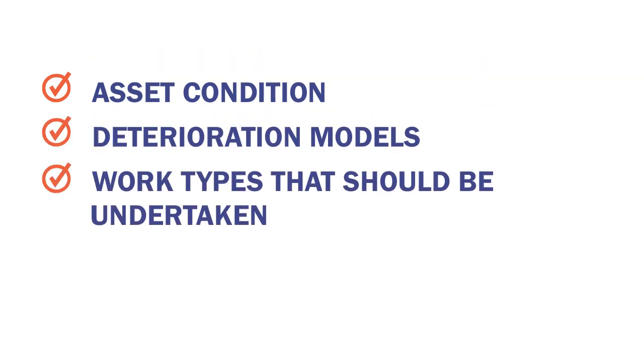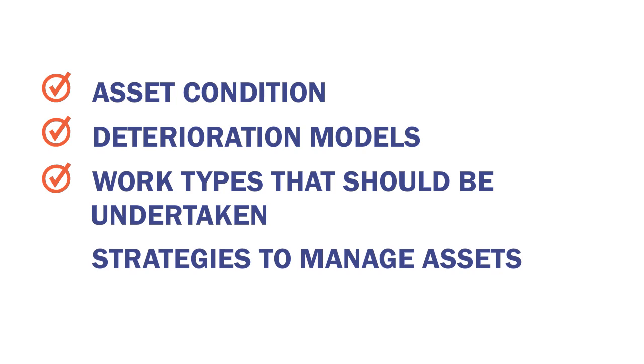A life cycle planning process must, at a minimum, include the following: the state DOT targets for asset condition, deterioration models, work types that should be undertaken to preserve or improve assets along with their relative unit cost, and strategies to manage assets while minimizing costs during the whole life of assets.